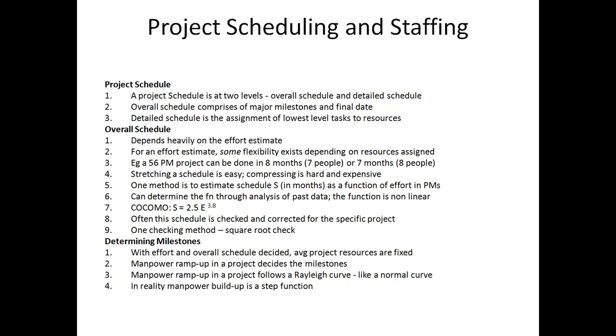Any such function has to be determined from data from completed projects using statistical techniques like curve fitting, regression curve fitting, and other means. This curve is generally non-linear as the schedule does not grow linearly with the effort. That you should bear in mind.